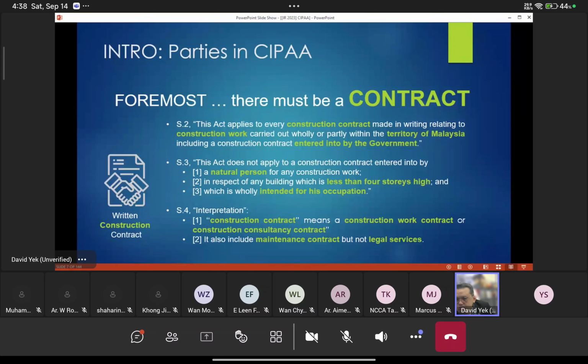If we are working as a sub-consultant under the main consultant, and the client defaults on payment, causing the main consultant not to pay us, can SIPA be filed? Yes, you can. In what situation will the claimant go to arbitration? As long as you have an arbitration clause in your agreement, the court will require you to go for arbitration first. And whether you go to arbitration or litigation, it can happen together with SIPA. When you take SIPA action, it doesn't mean you stop going for arbitration or litigation.